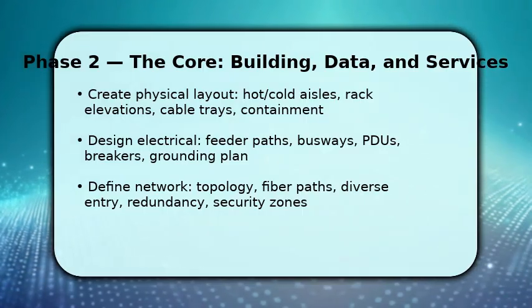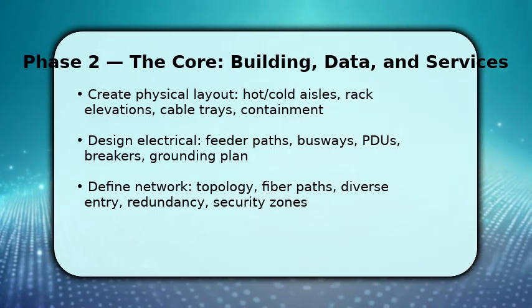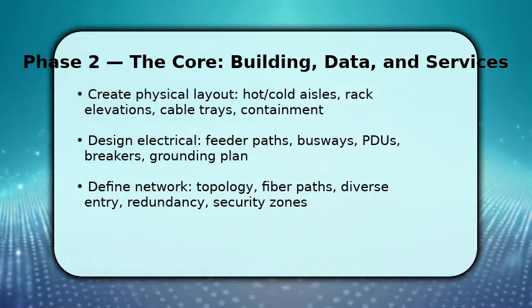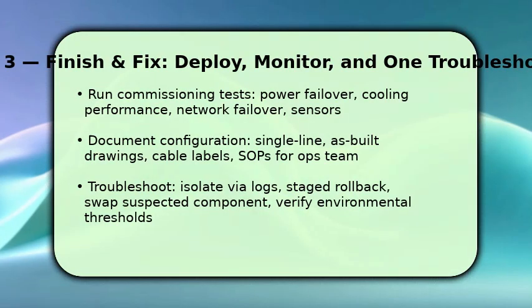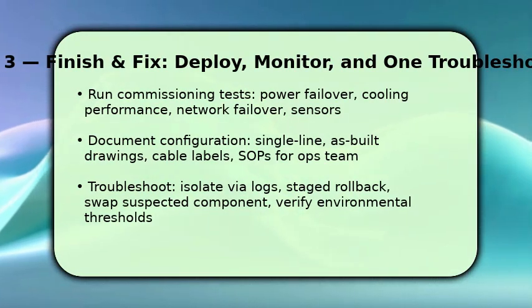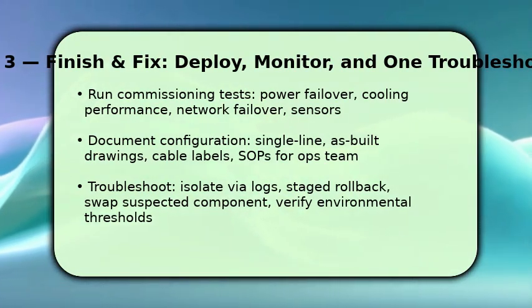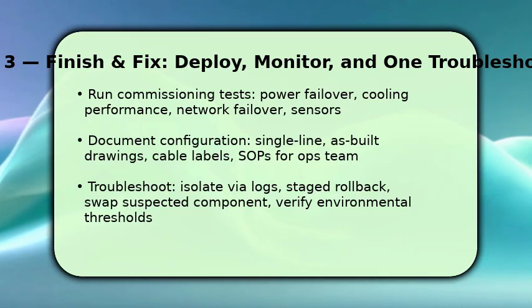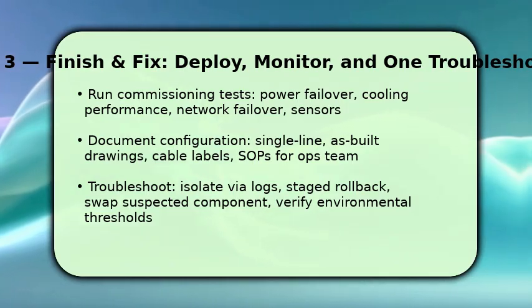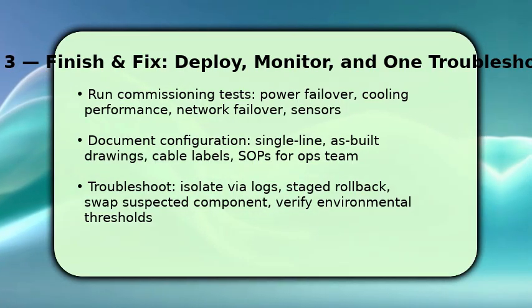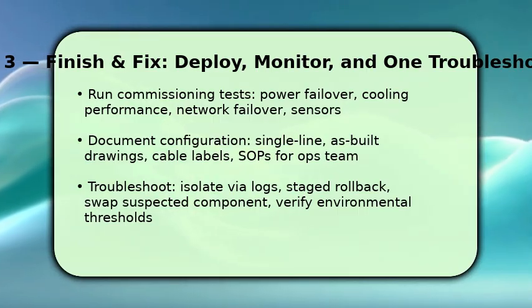You finish by commissioning and documenting everything before handover. Execute power failover, generator start, PDU load transfer, cooling capacity and airflow validation, plus network failover tests, record results and thresholds. Make sure as-built drawings, single-line diagrams, cable labels, and SOPs are complete for operators.